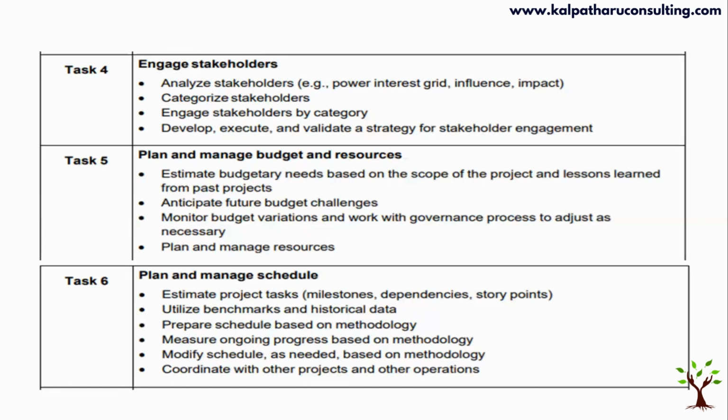And the risk register is also going to be considered because that is going to help you to come out with the reserves when you're going to manage or budget your cost, right? And when you're going to execute, you are also going to check whether the expenses are in line with the budget and also whether we are in line with the governance processes defined in the organization.